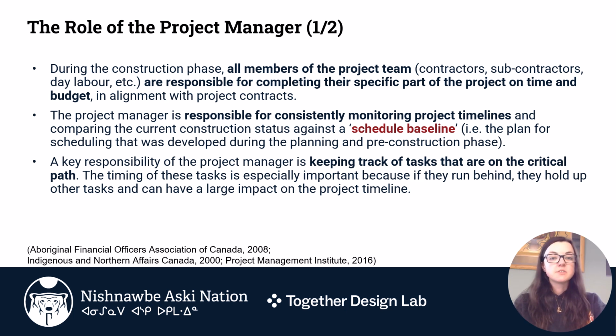A key responsibility of the project manager is keeping track of tasks that are on the critical path. The timing of these tasks is especially important because if they run behind, they hold up other tasks and can have a large impact on the project timeline as well as the project budget.